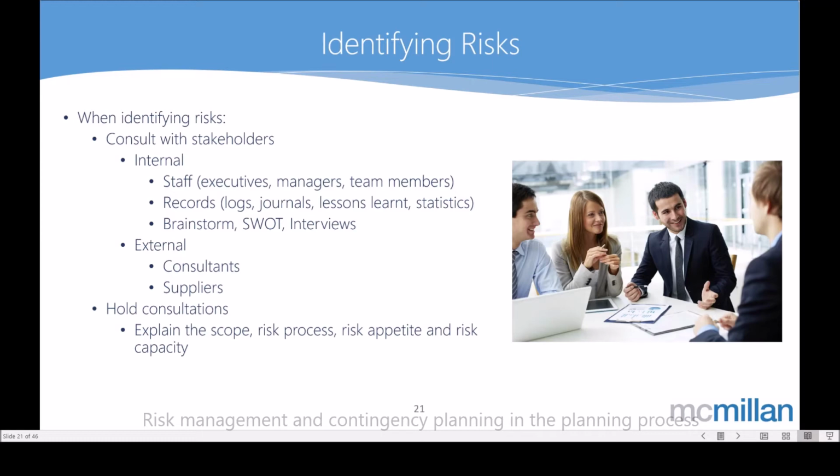And to do that, we should be consulting with internal stakeholders such as staff, be they managers and executives, whether they be team members, whether they be people who have some type of heritage in what we're doing, experience and so forth. We should be consulting with any records that we have, any record keeping. So, for example, if you have a lessons learned or you have some type of journal or logs or statistics available from previous similar endeavors, we can be sourcing that to identify risks.